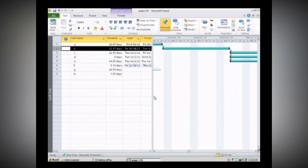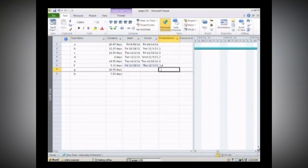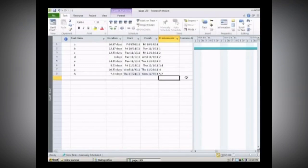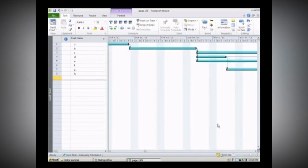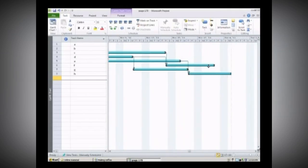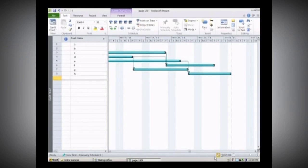Let's go back and finish up our predecessors. For line 7, which is activity G, the predecessor is line 4, which is D. For line 8, activity H, we have another merge activity — that is 5 and 7. So now we have created a graphical depiction of our project, and we can determine which are our ending activities. In this case we have two ending activities — activity F and activity H — with nothing that comes after them.